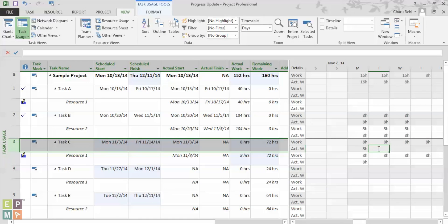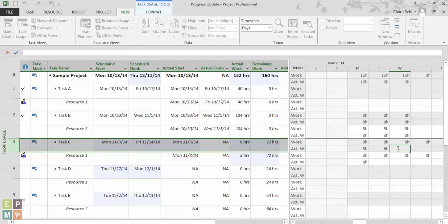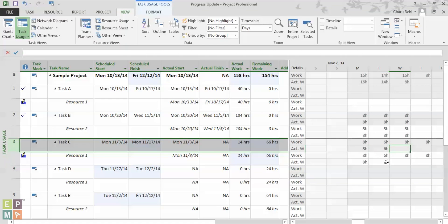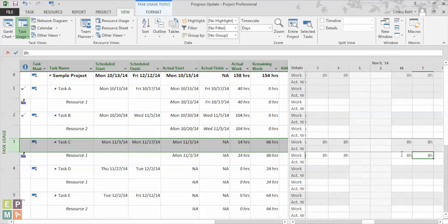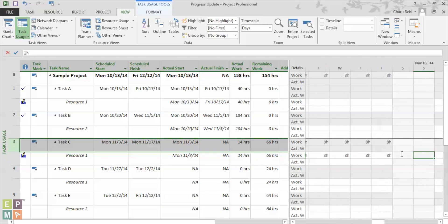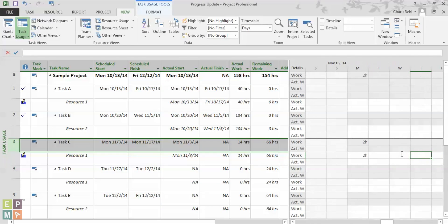What if on the next day, instead of eight hours, my resource only works for six hours? You see how the actual is automatically updated to six hours and the plan is updated to six hours and the remaining two hours get scheduled once this task is over.